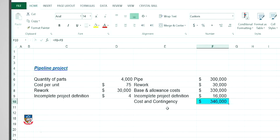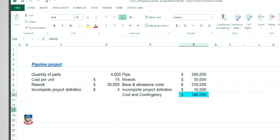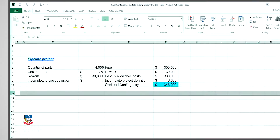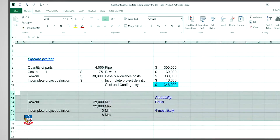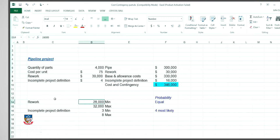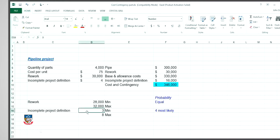Having a conversation with the project team, I quickly realised that there may be some variation to both the allowance and contingency. For example, the rework that I estimated to be $30,000 could be as low as $28,000 or as high as $32,000, so I end up with a range of dollars for this particular variable. We may also see some variation in the contingency — it could be as low as $3 and up to as high as $8, but most likely I think it will be $4.